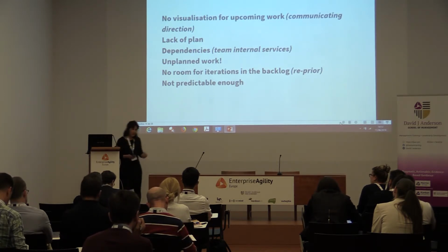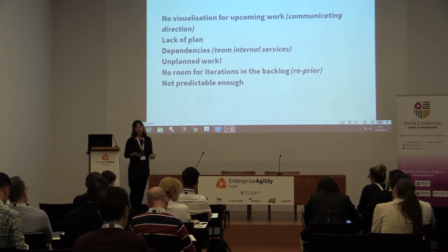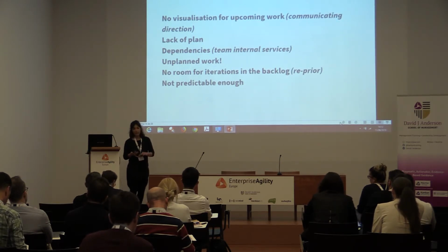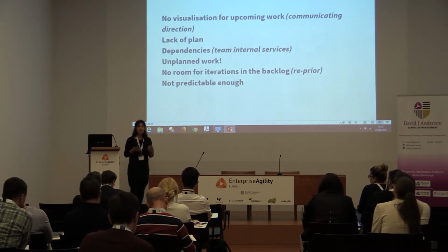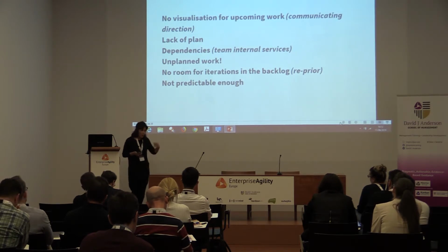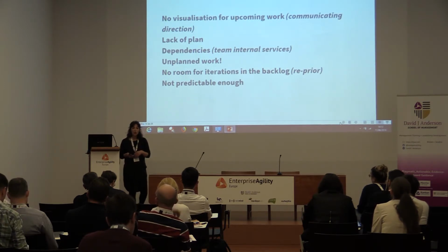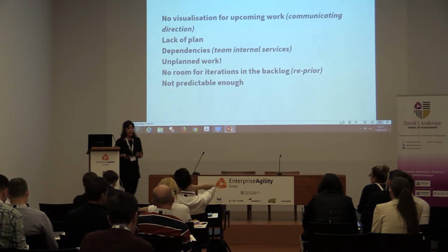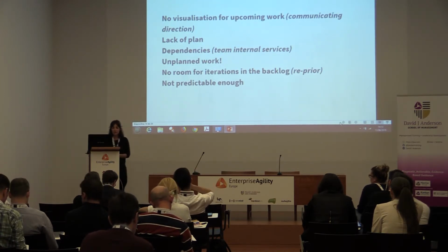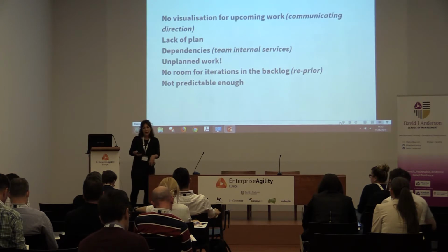The dependencies, internal ones in the team. As in many teams, we are working with multiple skills: UX, backend, front-end, QA sometimes. So all of that was a big problem for us. Sometimes the backend work was done, and was there for many, many weeks, waiting for the front-end one to be delivered, to be pushed to production. This is something that we cannot afford, because time to market then increases.